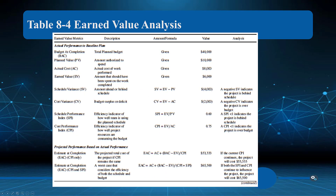Here is a comprehensive chart summarizing all the metrics. BAC is forty thousand, planned value is ten thousand, actual cost is eight thousand, earned value is six thousand. You don't need to memorize these formulas, but given values you should know how to calculate them. If the current CPI continues, the project will cost fifty-three thousand three hundred thirty-three; factoring in both CPI and SPI, the worst case is sixty-five thousand five hundred — a huge variance from the forty-thousand budget.